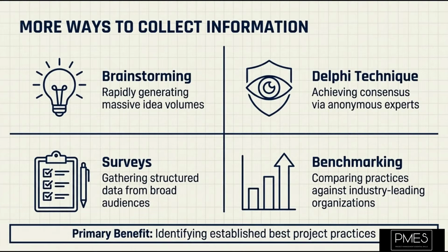One common confusion I want to clear up right away is the difference between requirements and scope. Requirements are the detailed needs and expectations that stakeholders have for the project's product, service, or result. They are the granular details. Scope, which we will define in the next lecture, is the sum of all the products, services, and results to be provided by a project. Requirements feed into the scope. The requirements are the specific desires, and the scope is the overall boundary of what the project will deliver to